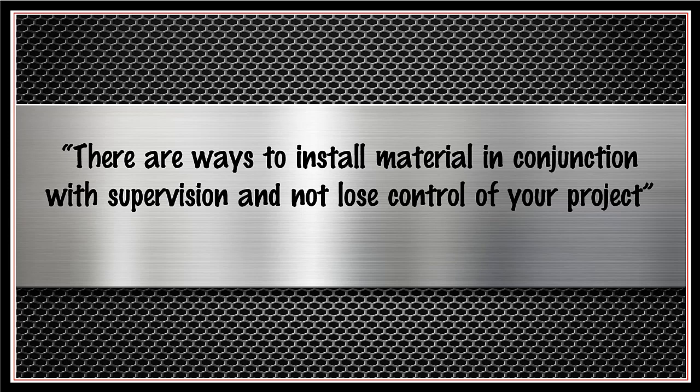impacting your labor budget. You should also focus on tasks that you can wander in and out of without affecting the productivity of the other crew members. Tasks like panel makeup, trim out, and layout work well for this. Certainly, you would not want to be leading a major wire pull and insist that work stop while you run over to answer a question in another area of the project or attend a meeting, right?